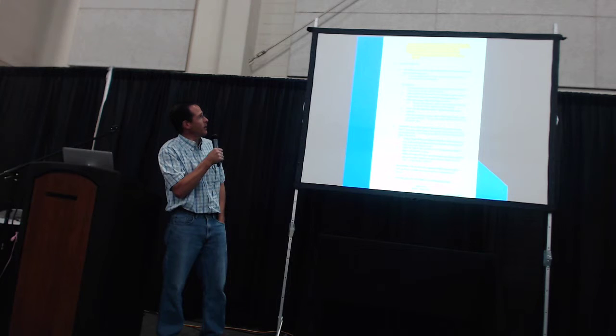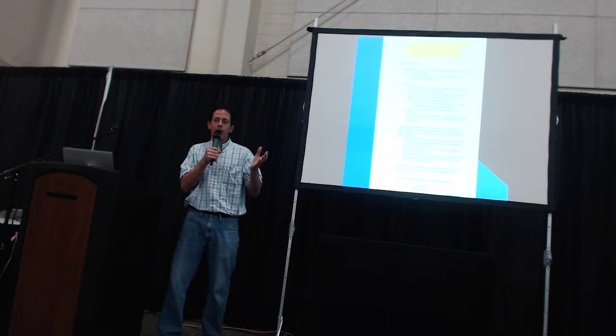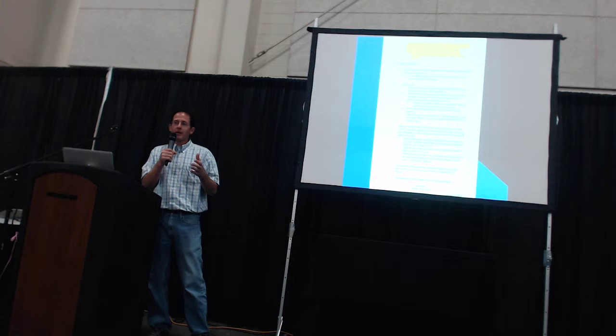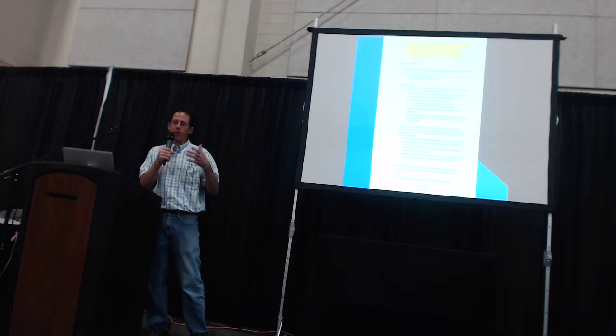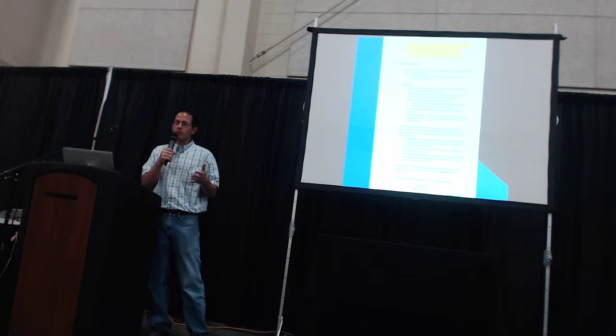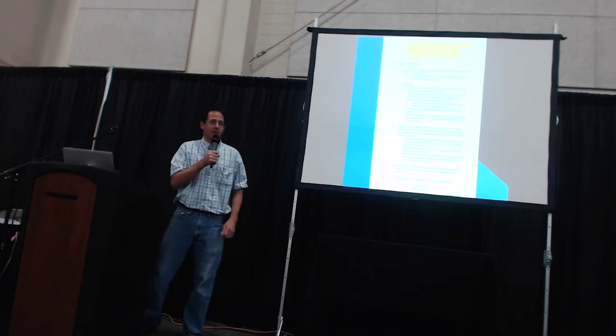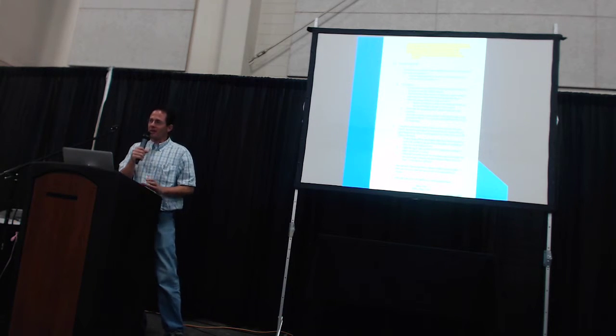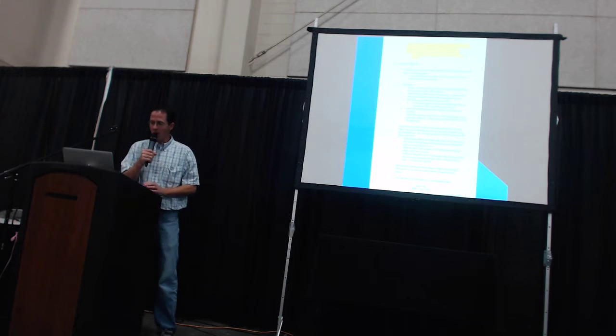I've had a job where they actually moved the pile out, and as I looked at the driving of several of the piles, they did not meet the criteria, and so they actually had to remobilize the crane and the hammer and everything back to verify that the piles that didn't meet the driving criteria were okay. And you can imagine how happy that made them not.